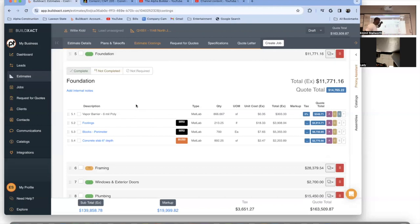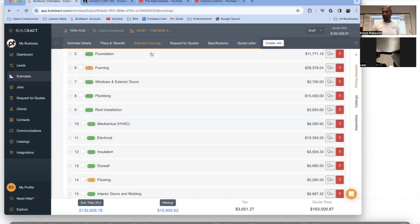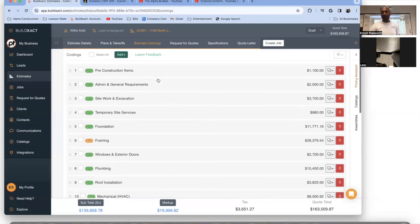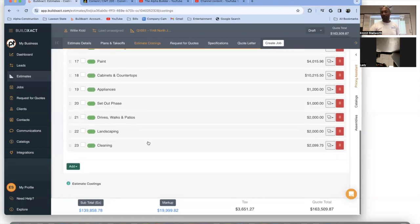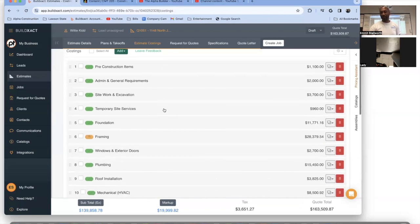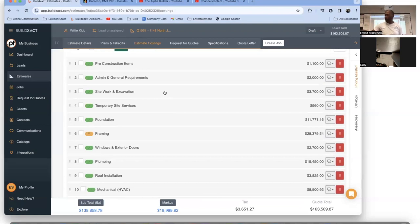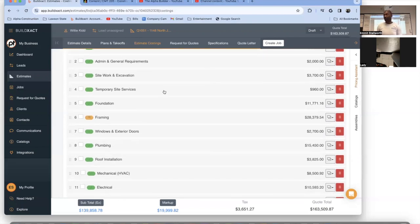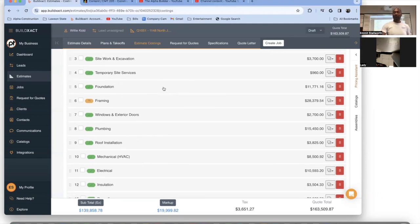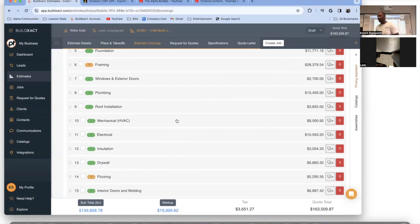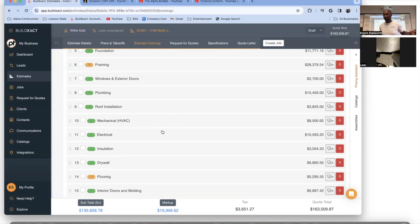The more you understand construction, the more you understand how things are built, the better you'll be at calculating unit costs. I developed this whole estimating system and I just keep getting better and better at it. This is how you build a house in order: permits and admin, site work, excavation, temporary site services, foundation, framing, windows, rough plumbing, roof, mechanical, electrical — because the electrician can run his wires around everybody else's stuff.